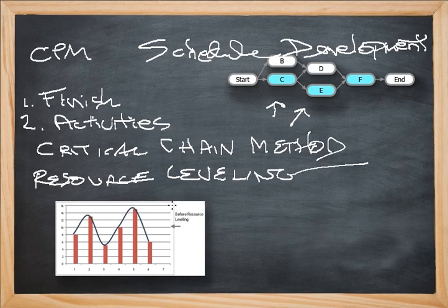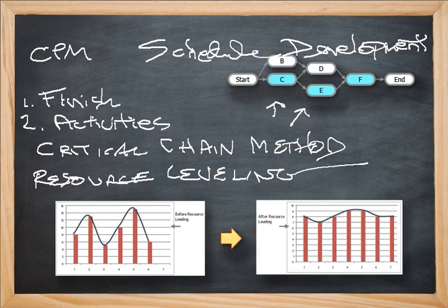As you can see in this graph, the above network diagram may not be too realistic. By resource leveling, you can flatten out the work to better match staff members allocated throughout the project. Reapplication of resources will, like the critical chain method, most likely also change the relationship of the network diagram. But applying resource leveling should really help make the schedule realistic.